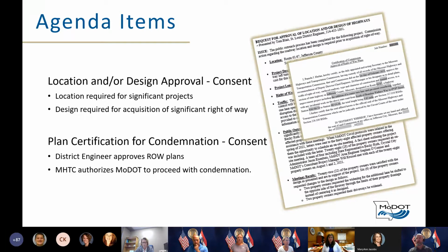If condemnation is required, the district will request commission approval. Action is required by the commission to authorize MoDOT to proceed with condemnation. Once plans are certified by the commission, they cannot be modified without additional commission action. This is why it is very important to have accurate right-of-way plans at the time of condemnation.